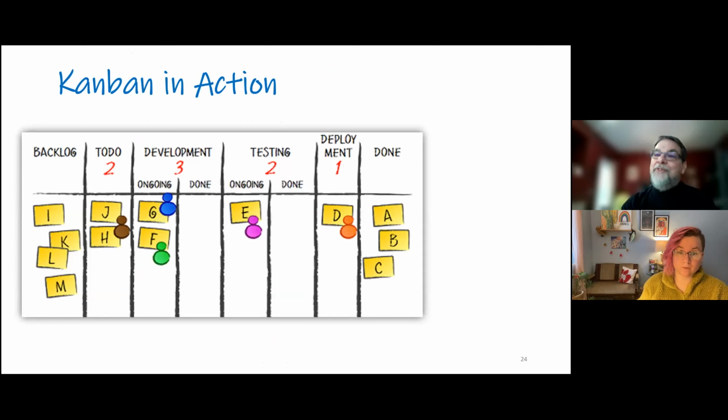So if I have a hard time not doing 10 things at a time, by the way, I like to multiplex. But every time I do, there's this thing called context switching, and I can lose 20% of my productive capability. I can hemorrhage my own capacity to do good. Unless I have these helpful numbers that say, Doug, you can only do 3 things at a time. Out of your backlog, you can work on 3 user stories. You get to pick which 3, but until you get one of those done,